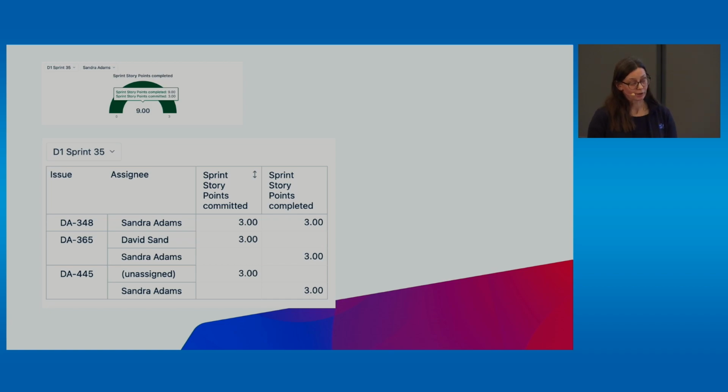Those are historical measures, and they represent data at the specific time of activity. What was the assignee, what was the issue type at the point when the sprint was started, and what is the assignee or issue type or priority at the point when the sprint completed. Sometimes it's a valid expectation that one particular user should have completed the same as what was committed for him or her.